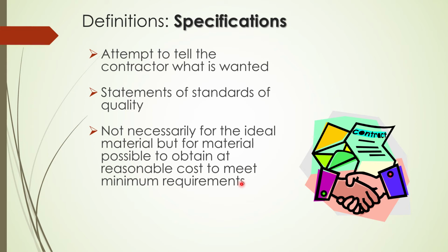There's a delay in construction or manufacturing of that product. So sometimes what we'll have to do is find an equivalent product that will meet the design needs. It could be higher cost or it could be a lower cost that helps save money. So that sometimes happens, and that's where you're involved, because you're in the day-to-day operations out there with the inspection.